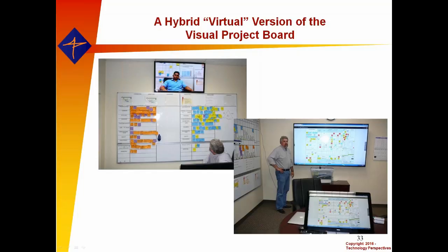So the goal is, when you're done with this review, assuming everything is good, we are agreeing as a team and management that we're freezing these particular aspects of the project. It's unrealistic to say we're going to freeze the entire concept, because often there's things that are still subject to change because of customer needs changing or competitive moves, but we freeze as much as we believe we can, and more importantly, as much as we need to ensure that we can have schedule fidelity with a launch date. So the trick here is the design review is kind of a knowledge gate. If we pass through the design review, we should be ready to freeze some or all of the aspects of that product at that point in the project.